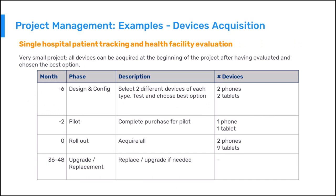In terms of device acquisition, the general recommendation is to proceed in phases as advised in the official guidelines. Following the first scenario, where 15 devices are needed, the strategy could be: acquiring two different devices of each kind — phone and tablet — to conduct tests and choose the best option during design and configuration; acquiring two devices based on the pilot plans; and acquiring the rest — two phones and nine tablets — as a single batch, then proceeding with replacement or upgrade when needed.